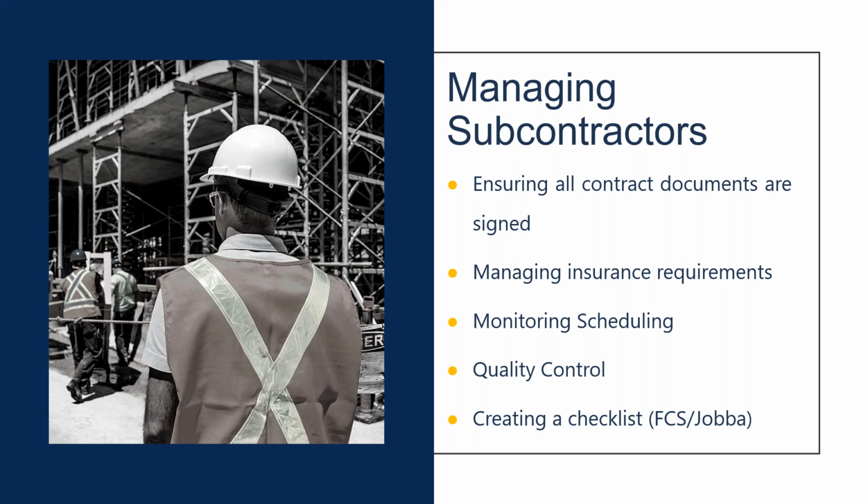Okay, creating checklists is one great way that you can ensure that whatever it is that you need from a subcontractor. So let's say you need evidence of their insurance. You need them to sign the subcontract agreement. You need them to provide various other documentation in order to provide this project. You may need certain product specs or whatever it might be. You have all that on a checklist. So your people that are managing this know that this checklist needs to be completed. They have all the documents, and it creates documentation that creates accountability. That's what it's about.